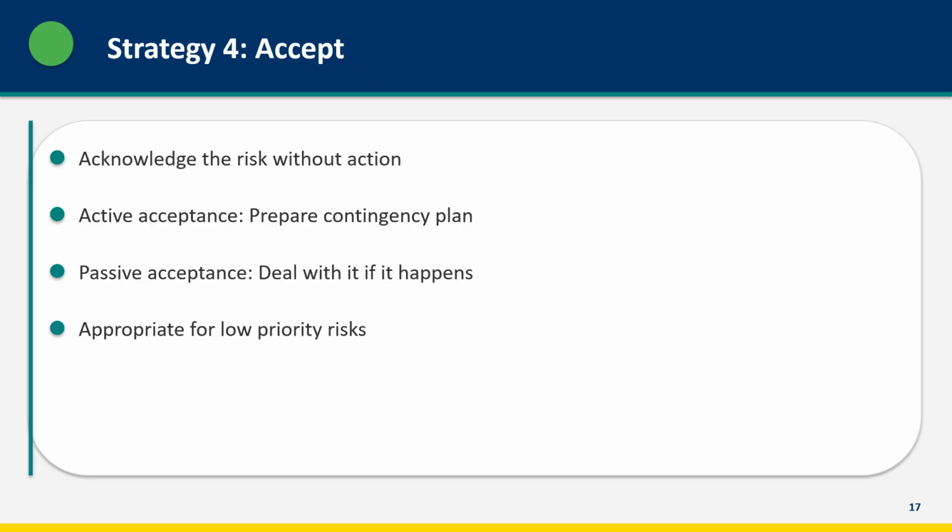Acceptance is appropriate for low priority risks where the cost of other strategies exceeds the expected impact. You can't respond to every possible risk. Some you simply accept and move on.